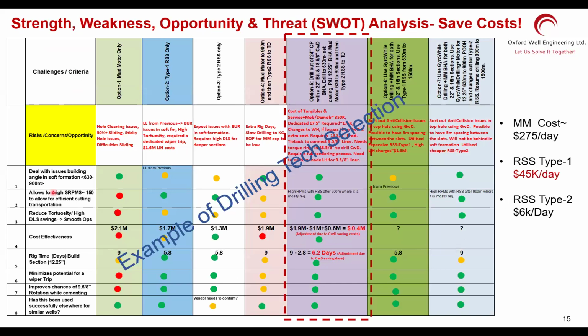You write down your challenges, you put down your options, and then you put the money on it, and ask if this technology gives me 1, 2, 3, 4, 5, 6, 7, 8, my concerns, my deliverables, yes or no, or you are not sure. Yes means green, you put the dot on it, put the monies on it, you can select the technology that gives you all green.